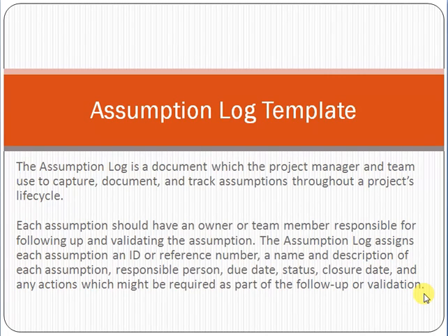At the early stage the assumptions will be open. Why open? The concept is that when the assumption is verified as a correct assumption, then we will close it. Until the assumptions are verified, they will remain open.